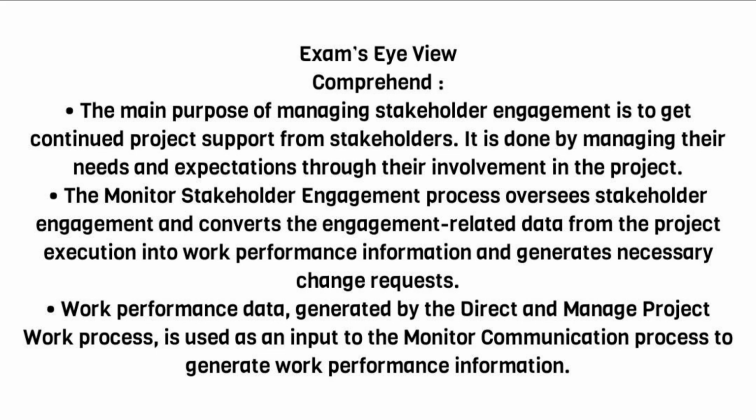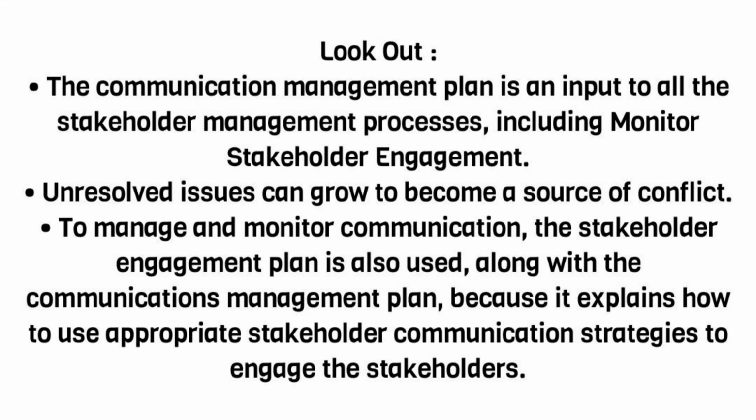Work performance data, generated by the direct and manage project work process, is used as an input to the monitor communication process to generate work performance information. Look out. The Communication Management Plan is an input to all the stakeholder management processes, including monitor stakeholder engagement. Unresolved issues can grow to become a source of conflict. To manage and monitor communication, the Stakeholder Engagement Plan is also used, along with the Communications Management Plan, because it explains how to use appropriate stakeholder communication strategies to engage the stakeholders.